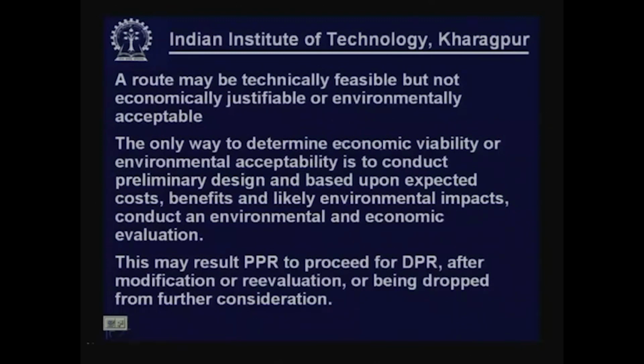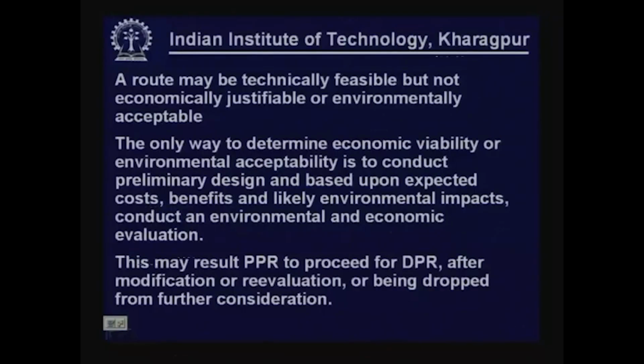And the only way to determine economic viability or environmental acceptability is to conduct a preliminary design. Unless we know that this is the preliminary design, and this is going to be the block cost or the approximate cost of construction, we cannot go for calculation of the expected economic cost, economic benefit, and also the likely environmental impact.